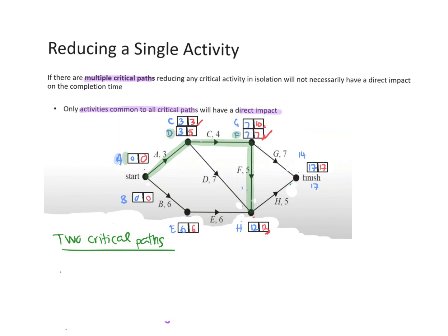So we had the numbers were all the same. And then I went back to H. So that was one of them. So if I wrote that out, A, C, F, and H. And now if I look for the other one, so B was also 0, 0, and E, and you can see there, that was another way along the bottom, that also produced 17.